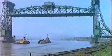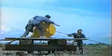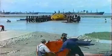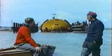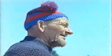So we sealed each boiler in a slightly pressurized state, slid them down a slipway at the factory into the River Tees, and towed them by tug the 300 miles down the North Sea to Bradwell waterside on the Blackwater. At the waterside, we had constructed a twin-armed quay for the reception of the boilers. The arrival of the first boiler attracted large crowds, including some colorful local characters.